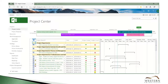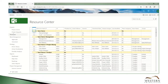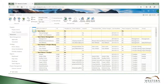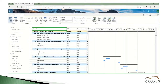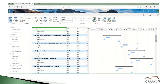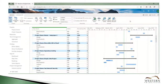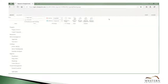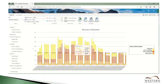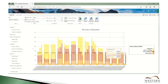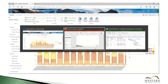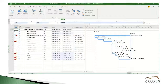We use Microsoft Project Online to quickly view resources, schedule and capacity. From the Resource Center we can select various named resources, view all the projects that they're assigned to. Assignments are grouped by project and by date, and we can go into the Resource Capacity Planning Center to determine that we are over-allocated on a few resources in this quarter. So we go to the Project Professional desktop application to do our deep scheduling work.